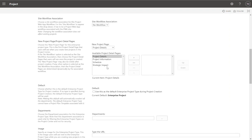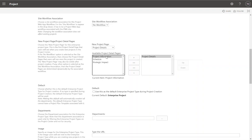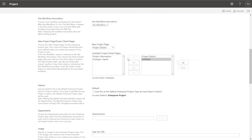We've got a selection of different pages here — these are the out-of-the-box pages. We've got 'Project Details,' which is high-level information. We have 'Project Information,' which I believe contains every single enterprise custom field that you will create — we'll talk more about that later. You have 'Schedule,' which is a web page that shows you a graphical representation of your project schedule, just like the one in Microsoft Project Professional but in the web. We also have 'Strategic Impact,' which allows you to score your project against strategic initiatives within the organization. We'll talk more about that when we get into portfolio management — I'm going to leave that out for now and keep these two basic ones. Later on I'll show you how to create your own project detail page.